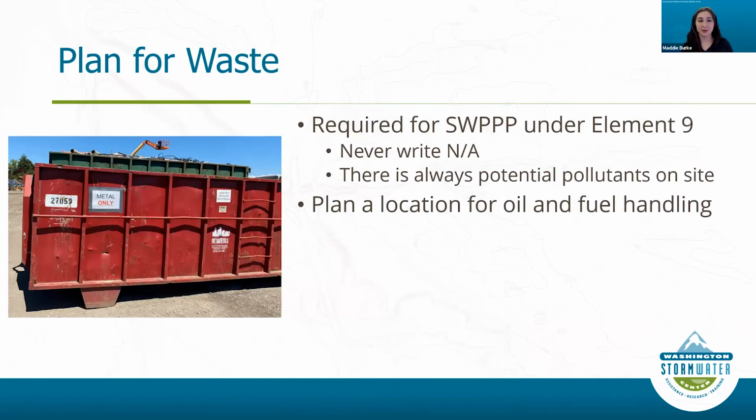Another great way you can help with pollution prevention from construction sites is to plan for waste. So you're required to do this as a designer if you're writing the SWP. Element 9 asks you to plan for waste. So this section should never say NA. There's always potential pollutants on every site. Check out Royce's presentation on element 9 as a part of this series.